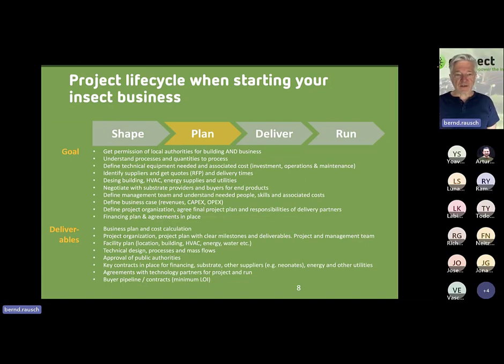You do more detailed designs on technology, processing, air conditioning, building, all of that. And then, of course, you need to start talking to and identifying substrate suppliers and buyers for your end products, so you have an understanding of which quantities they can provide. Very often we have seen projects failing because they were not able to get the substrates. Usually that should be close to you, and should be substrates that are not subject to a major cost risk. Today you calculate with a certain cost for substrates, and next year they double the price and your business is no longer profitable.